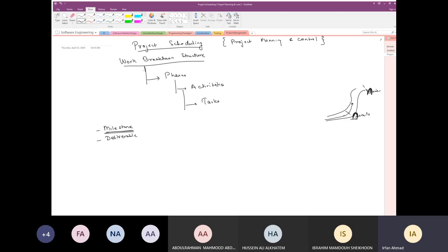You said that you have to interview clients, end users, and the client group to capture the requirements. Now, in the middle of the interviews, you have not completed them, right? If someone asks how much has been done or how much is remaining, you can give a rough idea. Yeah, we have done almost all the interviews, some are remaining, but this cannot be treated as a milestone because it is a bit vague. But let's say you completed all the interviews, no more interviews, generally speaking, with exceptions. That's a milestone. You know exactly that you completed it.